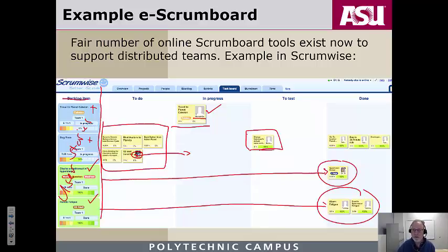If the user story isn't done, then it implies that there's some more work to do, and that you should have somewhere in one of these areas some work going on. But all our work's over here, so both of these are done. So the goal over time is to keep moving more and more stuff over into the done column. And when it's all done, you should meet the sprint goal, and all these, being the user stories, should be done as well. They should all be green.